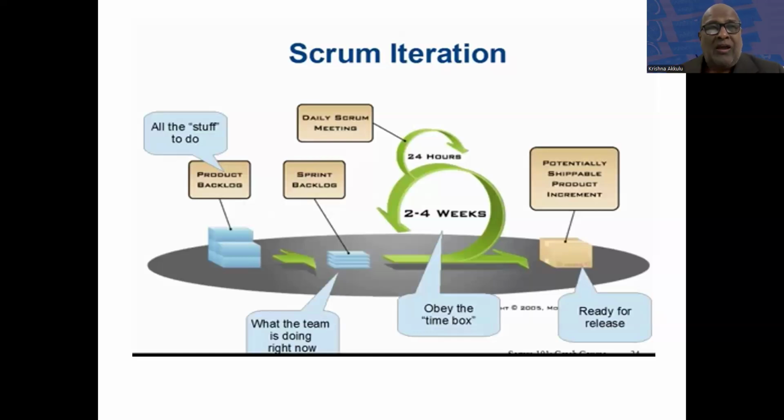As we already talked about, a sprint is a fixed time, like a 2 week sprint or 4 week sprint. In that period, we'll take 4 or 5 items, and for each user story we design, we develop, we test it, and we deliver it, right? So the process happens like that in the sprint. The end product is working, bug-free software, which is called a potentially shippable product increment. Why? Because we are not completing the entire project. We are taking incremental stories and building. That's why we call it an incremental potentially shippable product.